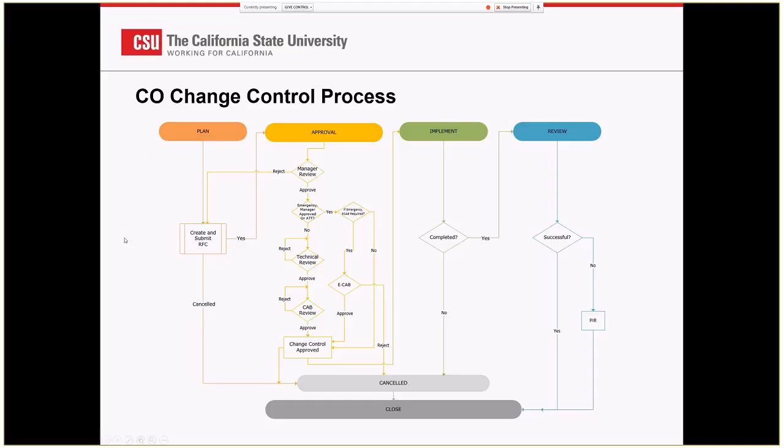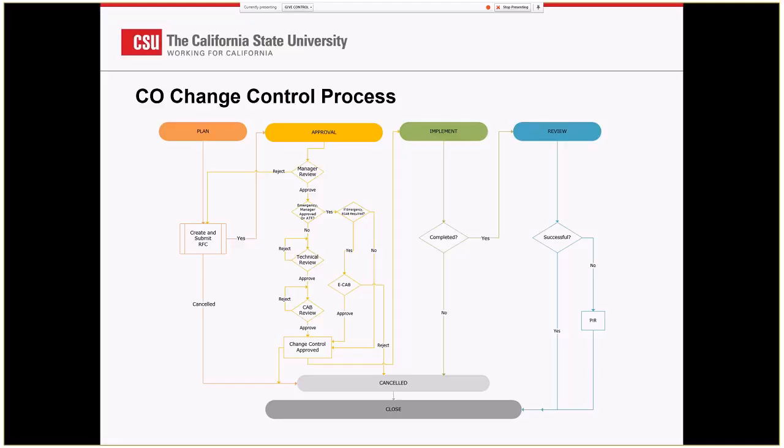Here's a basic workflow. The planning stage is somebody submits a request for change and we use the ServiceNow tool. Every change, no matter what category it's in, goes through a manager review process. The manager review process means, even though it's a routine or informational pre-approved, we want the manager of that department to be aware of it. The manager will know about how his resources are being used and plan out effective schedules.